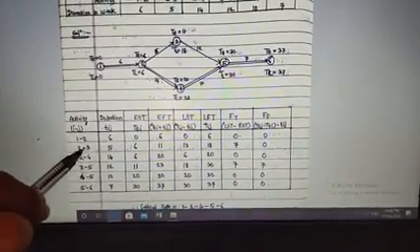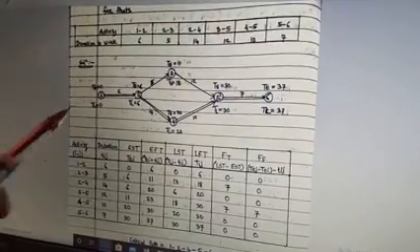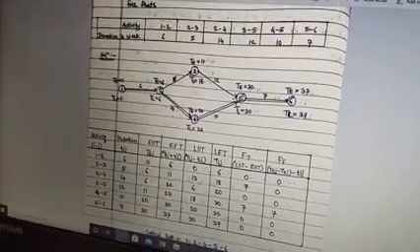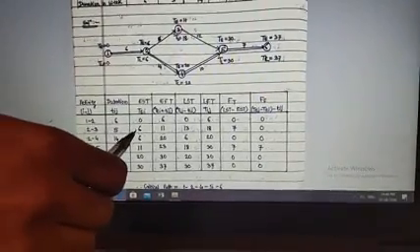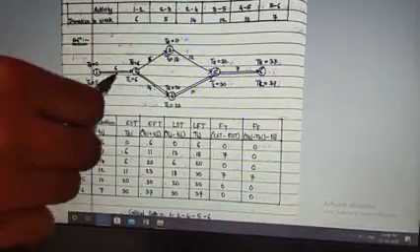Now consider the second activity, 2 to 3. When I say 2 to 3, we need to look at this particular linkage. Before we go for this particular activity, what is the minimum time I have to spend? The answer to that question is 6. How has 6 become my answer? The very simple answer is the previous duration.